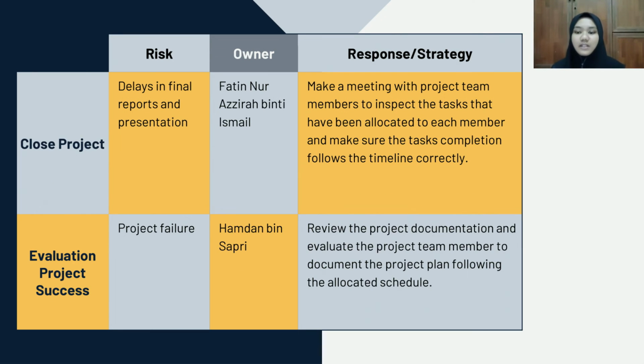The fourth risk is delays in final reports and presentation. This risk is assigned to Fatin Azzirah, our planning manager, who will manage the risk by arranging meetings with the project team members to inspect the tasks that have been assigned to each member. Then, she will make sure each member does their job within the given allocated time.